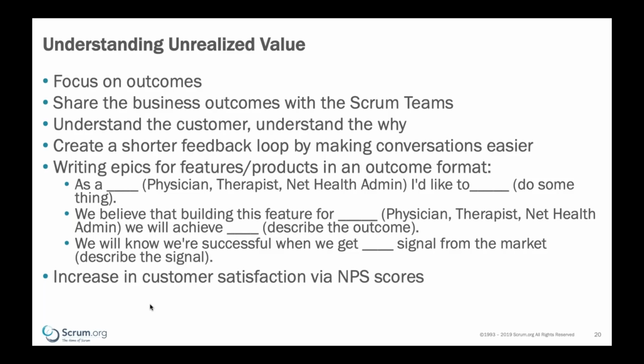I think another way that I could share something along those lines is around the employee satisfaction survey that somebody asked about. How often do we do it? I think that we did it every sprint, every 2 weeks, and what we realized was that there was probably some survey fatigue, and so maybe the results of that weren't as great because of it. So we changed it to every month, every other sprint. Nice.